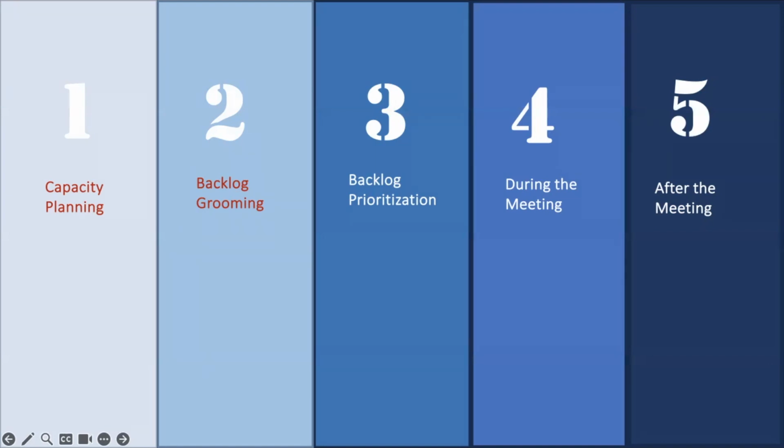Third one is backlog prioritization. While this is one of the simplest steps, you just want to prioritize the stories based on the value which you get from them. So definitely you would select the stories which are giving you more return on the investment. You can use different methods. There are techniques like ranking, the affinity method, and Kano analysis, and then prioritize the backlog, and have the stories which are important come at the top.